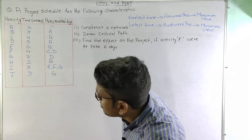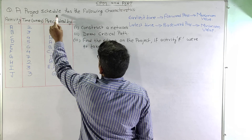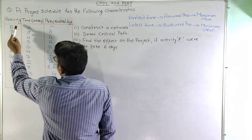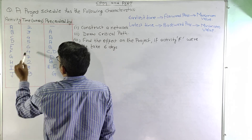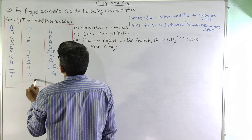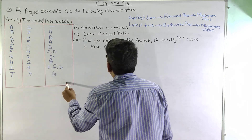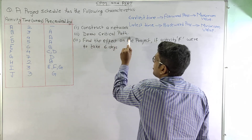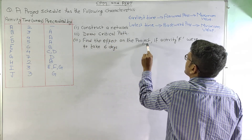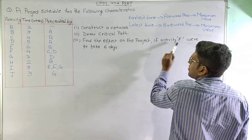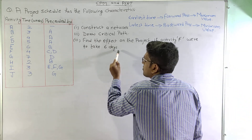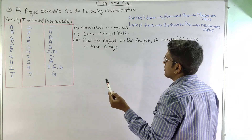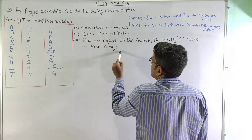Let's quickly move on to the problem. The problem says that a project schedule has the following characteristics. There are certain activities and the time of each activity is given along with the precedence. We need to construct the network diagram, draw the critical path, and find the effect on the project if activity F were to take 6 days. Initially, activity F is taking 4 days, so we need to find out what the effect will be if it takes 6 days.